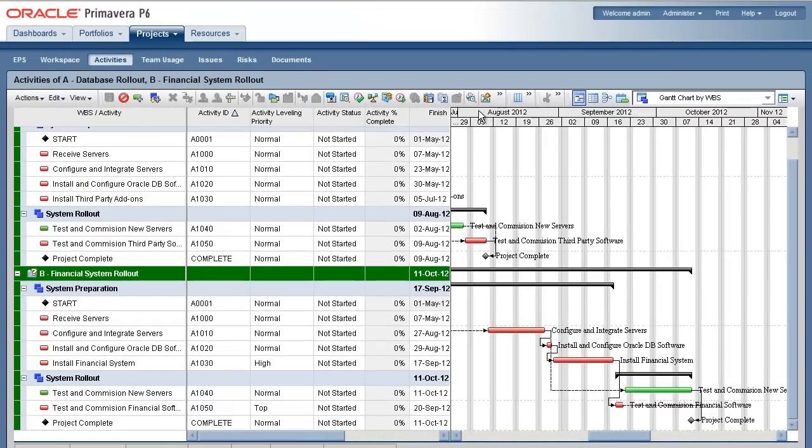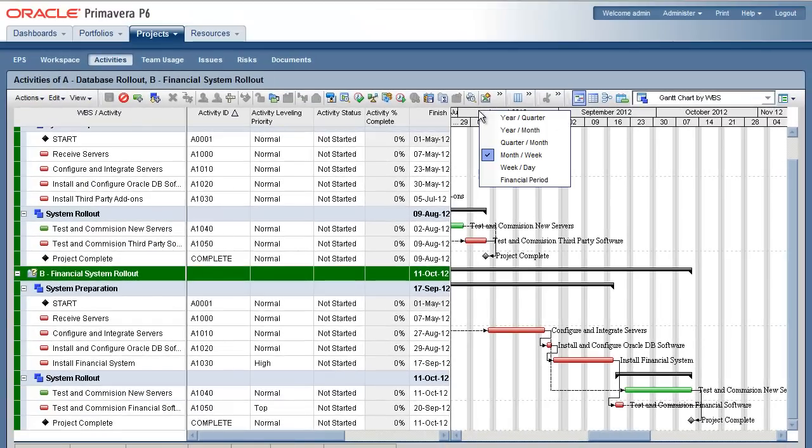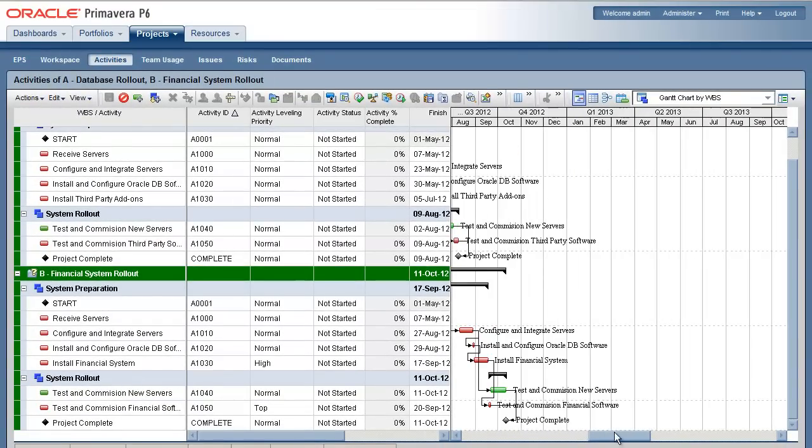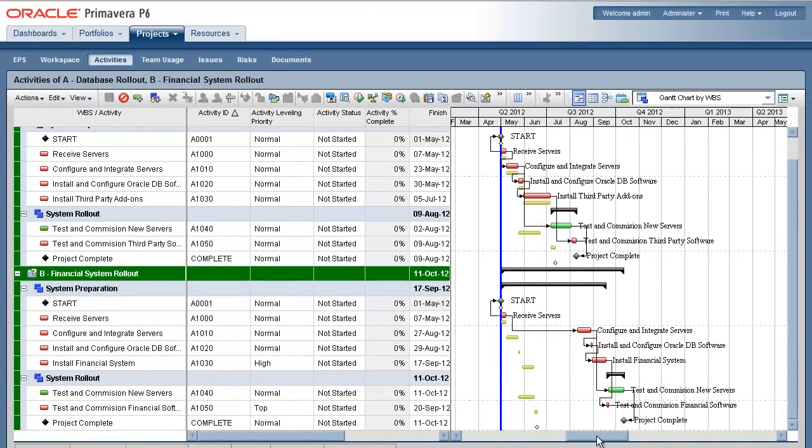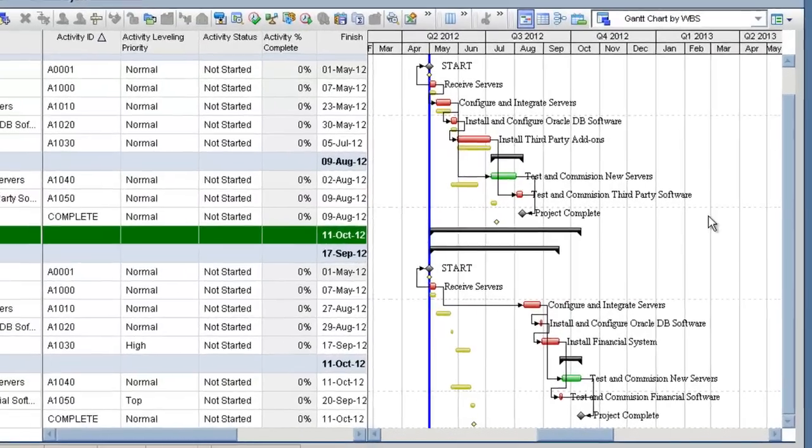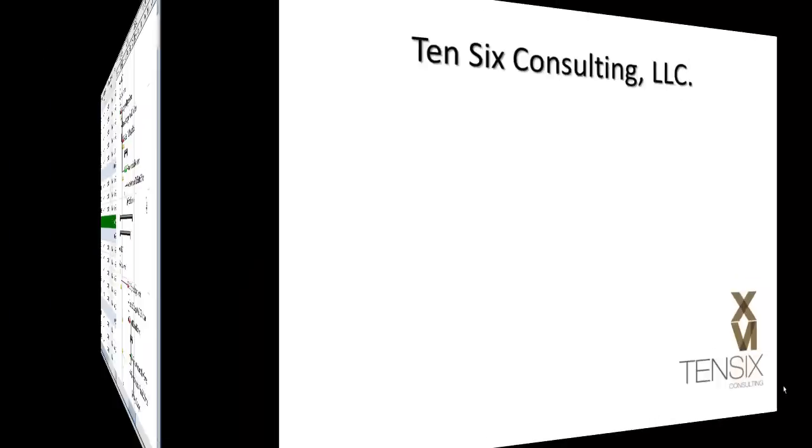This sample scenario demonstrates the power of P6 to quantify the impact of limited resource with mathematical certainties based on logic. In this situation, you would have to consider hiring in additional expertise to run this work in parallel as planned.